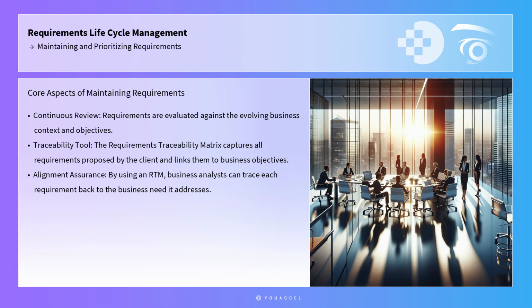The RTM is a document that captures all requirements proposed by the client and ensures that all these requirements are linked to the business objectives, test cases, and deliverables. By using an RTM, business analysts can trace each requirement back to the business need it addresses, ensuring that it remains relevant and aligned with the overall project goals.